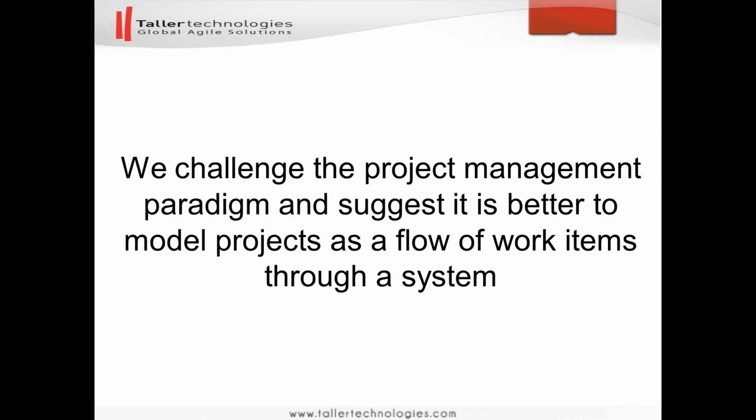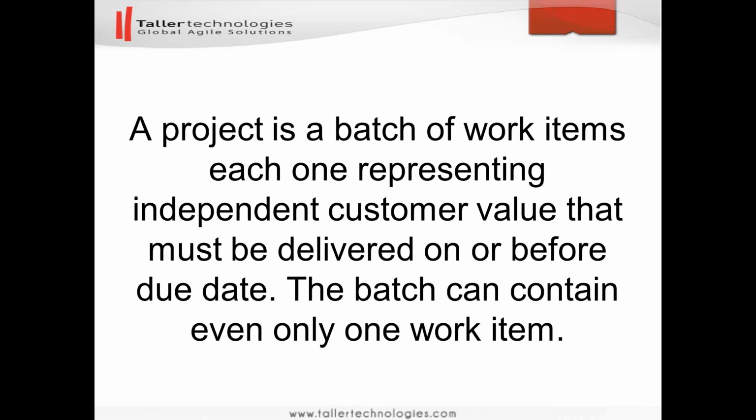We challenge the project management paradigm and suggest that it is better to model projects as a flow of work items through a system. A project is just a batch of work items taken out from the flow of work. So say the flow processes thousands of work items. We can name a batch of some 100 work items a project, but we have statistical data for the flow itself, and we will be using this data. So hence the definition of a project.